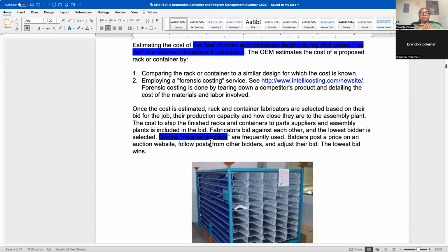They will have potential suppliers put in bids, and give them the requirements: is it a windshield, a chassis, a frame, and what are the requirements for shipping, line side display, cleanliness, whatever your list of criteria might be. That has to go into your list for the bid. Whatever your criteria is for your packaging, size, weight, material, it will then go into a bid review.